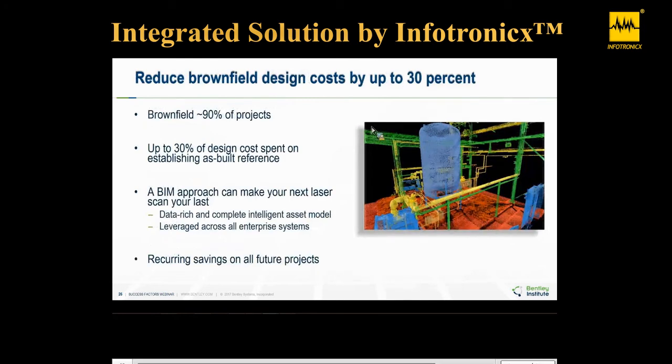Up to 30% of the design cost of a typical brownfield project is spent on executing and processing site surveys and laser scans to address all the out-of-date or missing plant records. At the project's end, drawings become out of date as equipment changes occur during operations and maintenance, forcing each project to repeat the cost of establishing an accurate as-built reference. Bentley's plant design solution breaks this cycle.